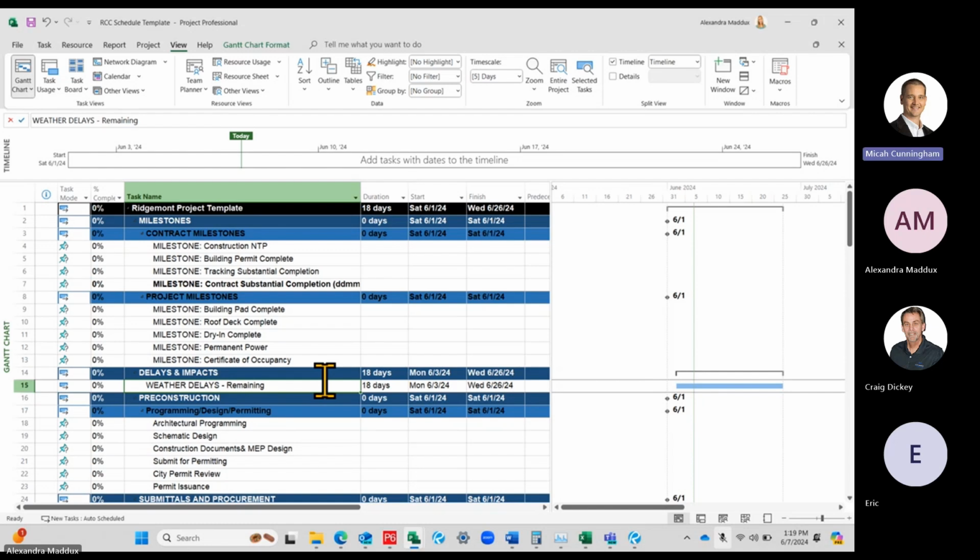I hope that my little graphic made sense. I hope it helps. It's already built into the contract schedule. Yes, so basically this diamond would be your substantial completion and your baseline. If you don't have it built in, then you're not accounting for it. That would be basically saying that all of your makeup days are going to be a Saturday. This is just your own buffer so that it's easier for you to make them up.